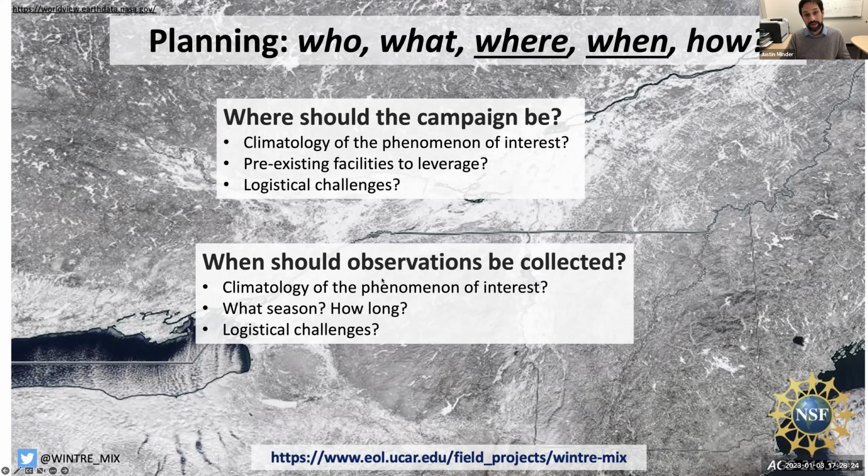You also want to consider, when should your observations be collected? Again, you want to think of the climatology of your phenomena of interest. What time of year, what season is this most likely to occur, whatever it is that you're trying to study. How long you're going to need to take observations for. What's a sufficient length of time to go into the field that you can have confidence that you'll be able to observe the phenomena you need to observe, and that you can observe it a sufficient number of times to collect good data.